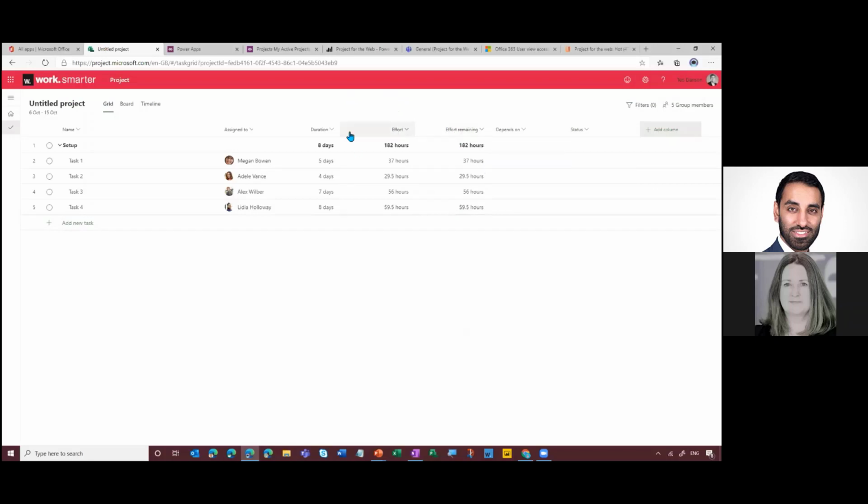And of course, the same as you can do within Microsoft Project on the desktop, you can have a differing duration to the stated effort. So even though the stated duration here is 5 days, we might say, well, there's only 8 hours of work to do across those 5 days, so spread it out. We can also go in, add dependencies, as I mentioned earlier, and this is quite handy because unlike Project on the desktop, this is automatically showing me the earlier tasks for me to be able to link in.